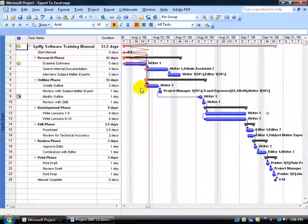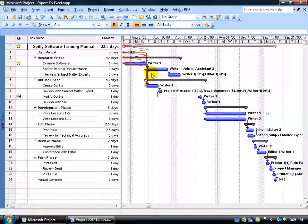Now that red line is cutting through that status date when it hits the task. If it's going to the left, that means it's behind schedule at that point in time. If it goes to the right, it means that we were actually ahead of schedule. If it just cuts right through, it means we were on time at that point in time.